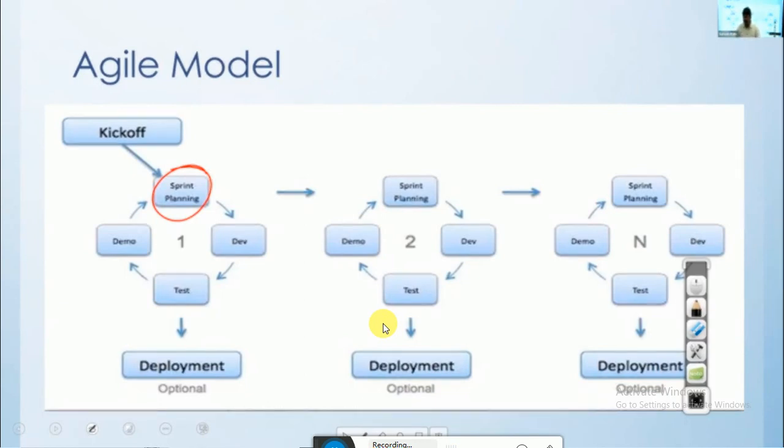Monday, discussion started. Meeting organized. End of the day, approach is completed. Tuesday or Wednesday, code is completed. We are not writing the code for 40, correct? Code only for 2-3 functionalities. Test cases only for 2-3 functionalities. 1 or 2 days is enough. Next day, again a meeting. Test execution, bug reporting, bug fixing, retesting, regression testing, another 2 days. Finally, Friday, there will be a final meeting.